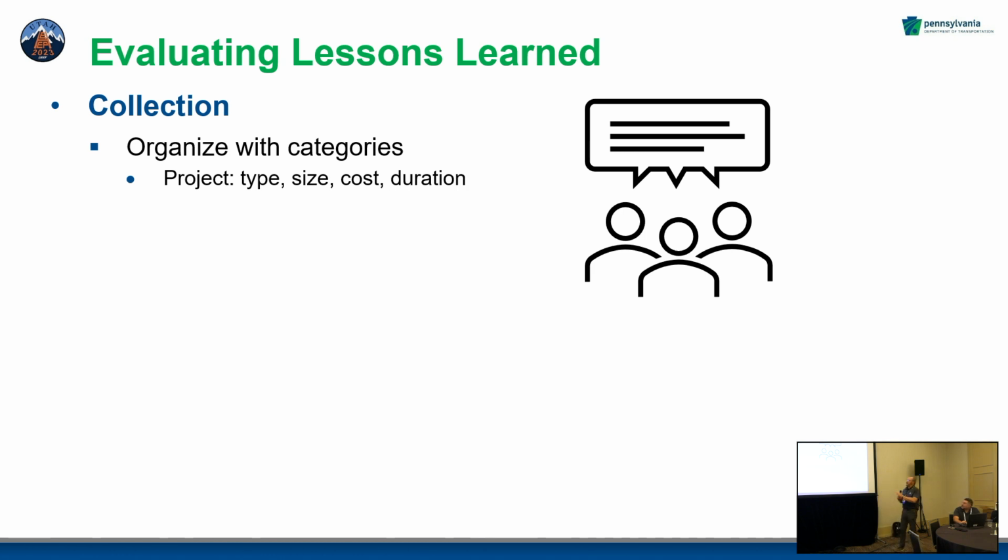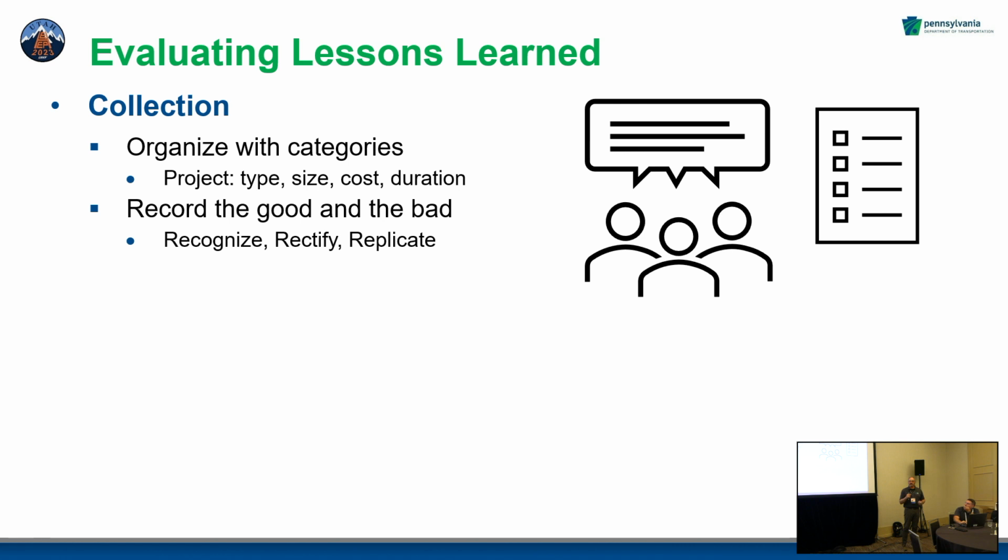So you collected that information as he talked. What we have to do is figure out how we're going to collect information when we're looking for lessons learned. Where are we going to extract that data from? And you can think about more than just that. It needs to be organized, because this data is going to be used for more than just lessons learned. That's your project information, your project data set that documents how and when it's done. So organize it with project type, size, cost, duration. You can add to it. Just put some organization to it. Categorize the information that's coming in.